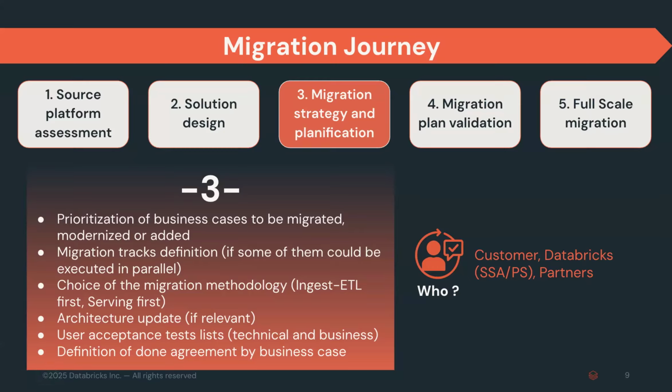We are big fans and big adopters, to whatever extent this is possible, of moving in an agile way. This being said, we are trying to prioritize either business first, like for instance, we prioritize end-to-end use cases to whatever extent it's possible, or ETL first, when we rather focus on the pipelines and prioritization of the pipelines migration, right? But in an incremental or waves fashion.